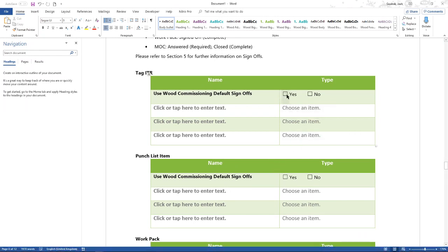So I could just tick this, but I'm not going to, because I want to show you what we would be doing. So we go with completed by, because that's the first one. The next one's accepted by, and approved. And notice I didn't put "by" there, because "by" is going to be default, so just completed, accepted, approved.